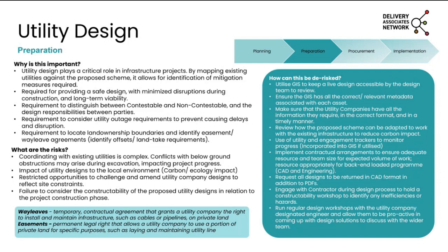Requirement also to distinguish between contestable and non-contestable assets. As Daryl mentioned previously, the utility companies will take a lot more responsibility for non-contestable assets. They will be the ones that are critical to your project delivery and carry the most risk. So establishing which are non-contestables and focusing on those will allow for successful delivery.